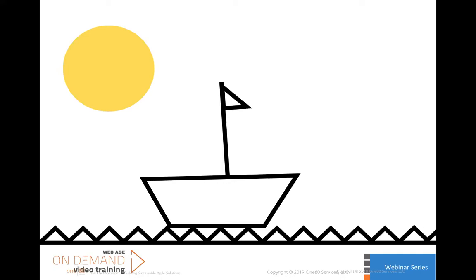All right. So what we're trying to illustrate here is the difference between how we gather requirements in a waterfall fashion, how we gather them in an agile fashion, and how we gather acceptance criteria while we're doing that. So the game here illustrates how we gather requirements in a more traditional waterfall project, right? I give you the requirements. You may get a chance to ask some clarifying questions. Then you go back to your desk or whatever, to your project team, and you actually build the software, you finish the project, and then you show it to the stakeholders, and the stakeholders say whether they like it or not. So in this particular example, how did we do? What could we have done different to make this project run a little bit smoother?